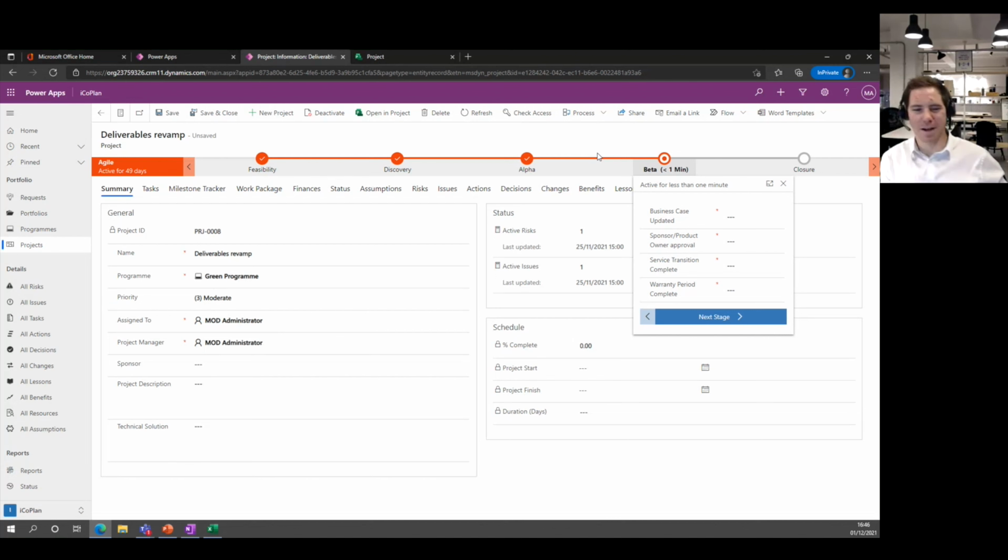Have you got your commercial signed off? And I'd be like, yes. And then, okay, well, now you're allowed to go to the next stage. And he'd be like, oh, thanks, Joel. Thanks for letting me go to the next stage of my program. But now you're able to do that digitally and almost automate all those processes and get actual approval from your procurement, or double check that the PO exists in SAP, for example, before it actually allows you to move forward to the next stage in the process.